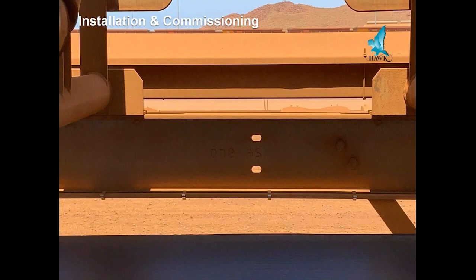So we spoke about clips earlier. The clips that you see here are just girder clips. This was a really early attempt, and I would not recommend girder clips again. The main reason is that the little sections of fiber in between the girder clips bounce around a lot. Also, these had to be installed at 300 mil center to center. That is a lot. It works out to thousands of clips, and you get pretty good at putting them on, but they still take a bit of time.